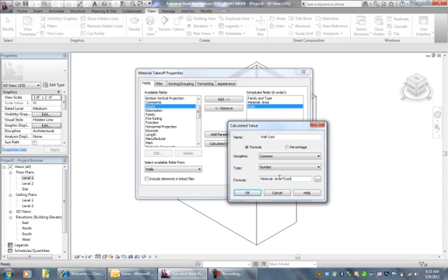So I'm going to have to divide it by 1 SF, so I can take out the unit of square feet.